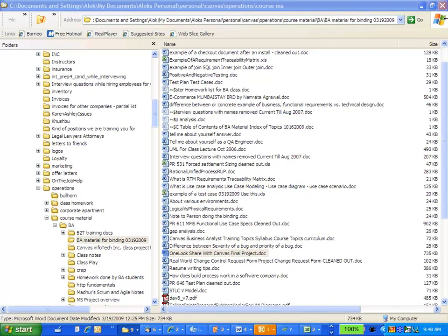What is the risk factor? Likelihood plus impact minus likelihood times impact. And then how do you make a risk table? You put the risk number, risk description, likelihood, impact, risk factor, and your response plans. Most probably the project manager.